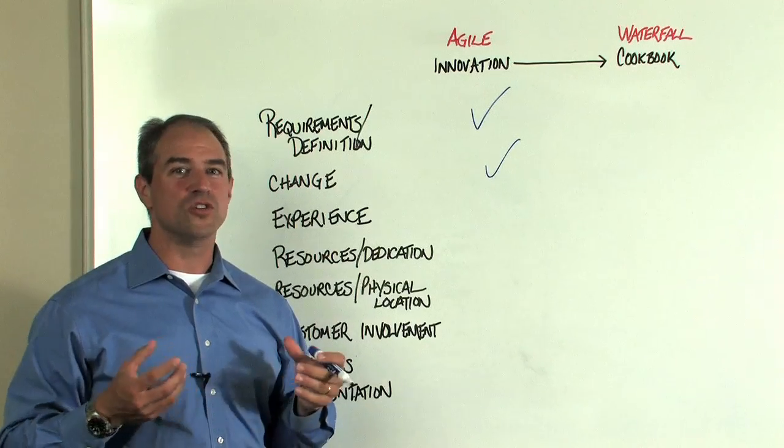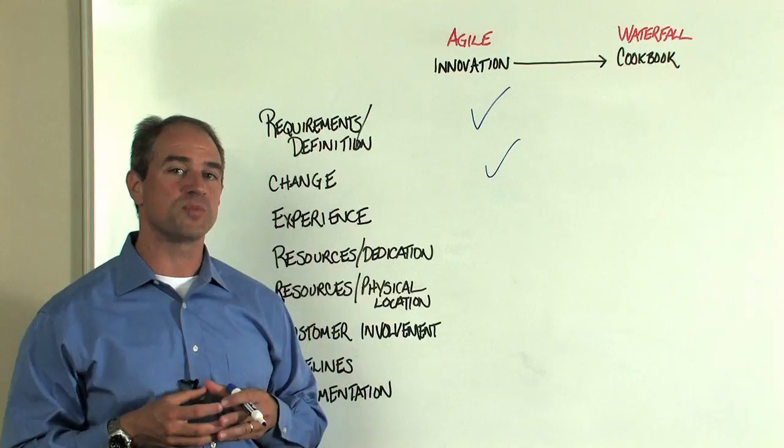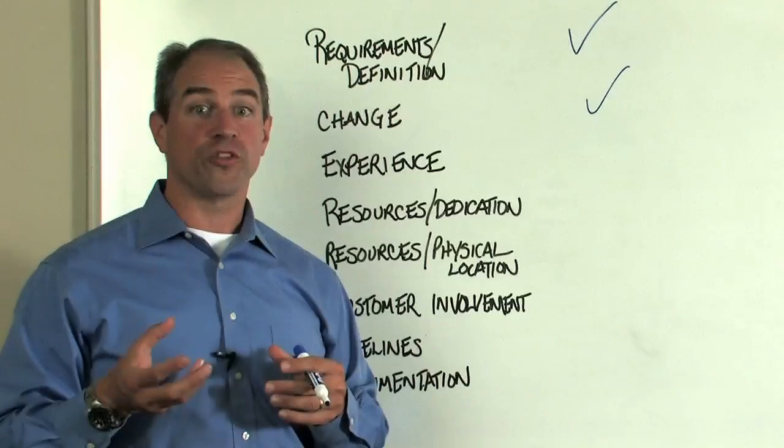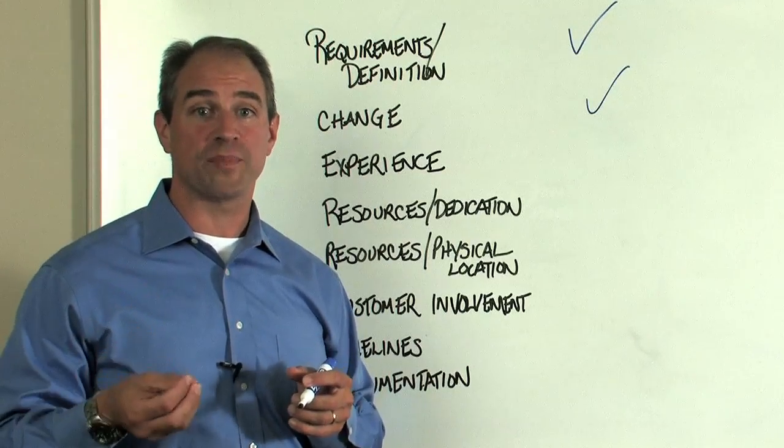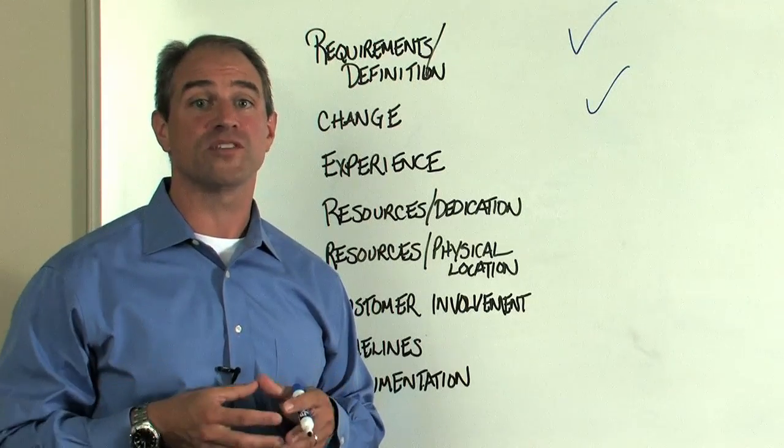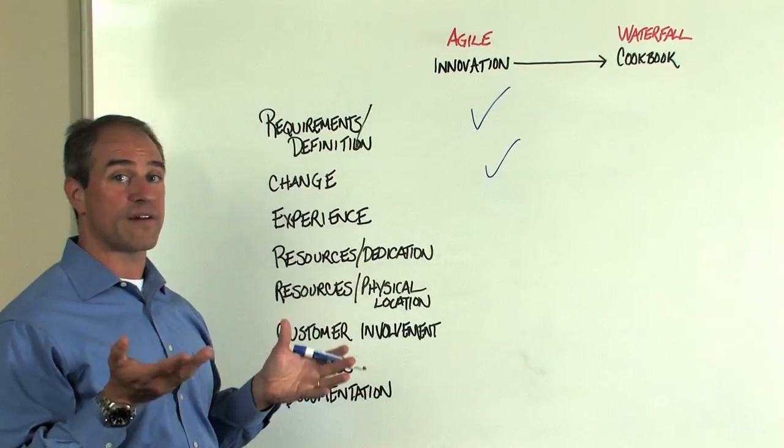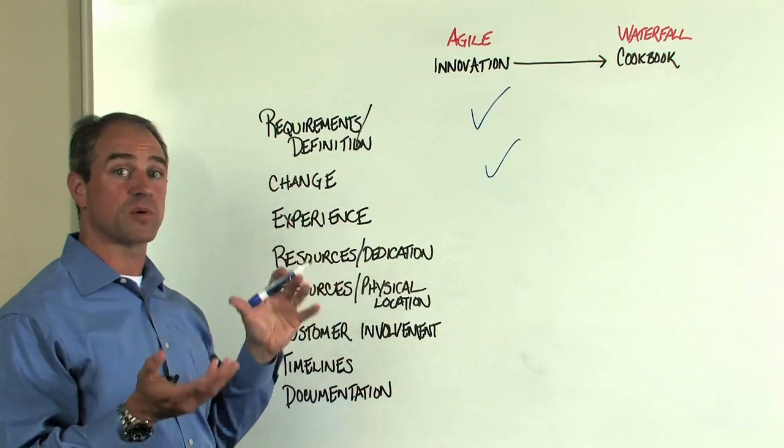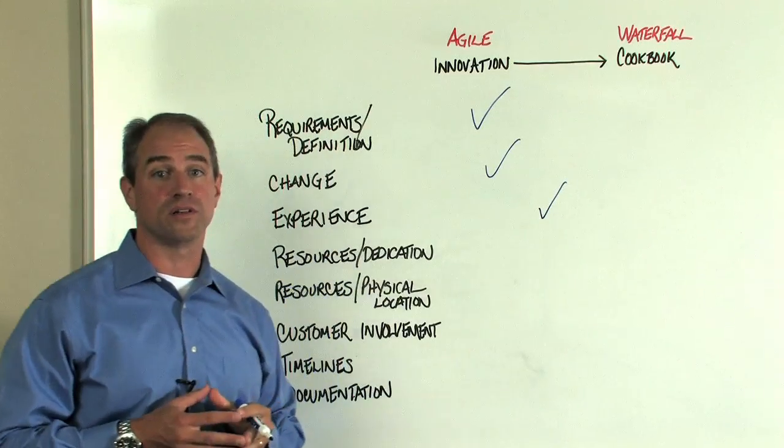Experience. Is this a new technology? Are these solutions new to your organization and do you have experience implementing them before? Are there people that are coming to the project? Do they have the right level of experience to be able to work rapidly to make decisions and to bring the right domain expertise to the project? Let's say we have a mix of that. We have some new technologies, but we also have a stable environment. That may put us a little bit closer to the middle of the spectrum.